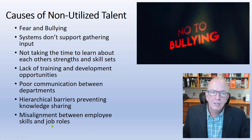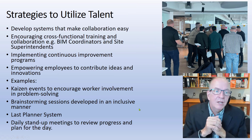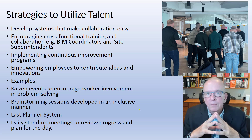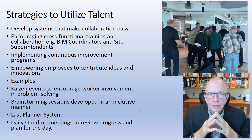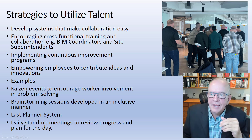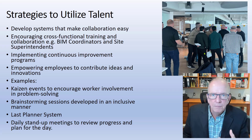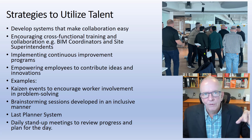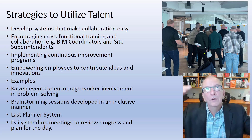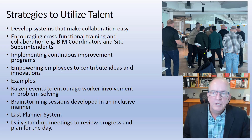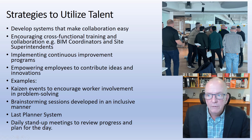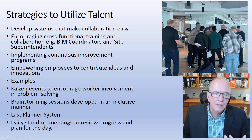Misalignment between employee skills and job roles — like the electrical faculty example — is another issue. So some strategies to utilize talent: we can develop systems that help us collaborate, like the Last Planner System in lean construction. It gets people together, talking, discussing things, looking at sequencing, and builds stronger commitments and more engagement instead of a top-down autocratic schedule handed down from above.